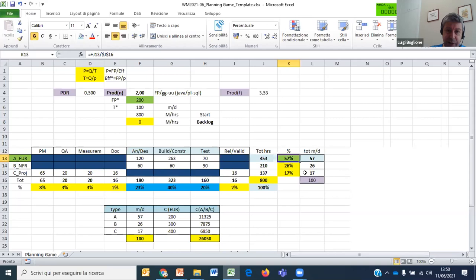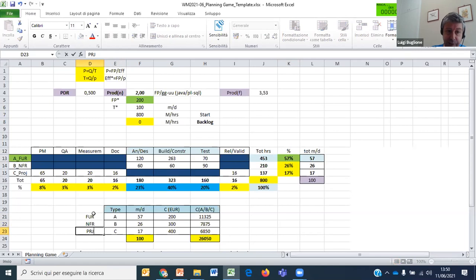At the end of the game you will have a percentage of effort related to function points, a percentage for non-functional side, and a percentage for project management activities. This is the output of the planning game.